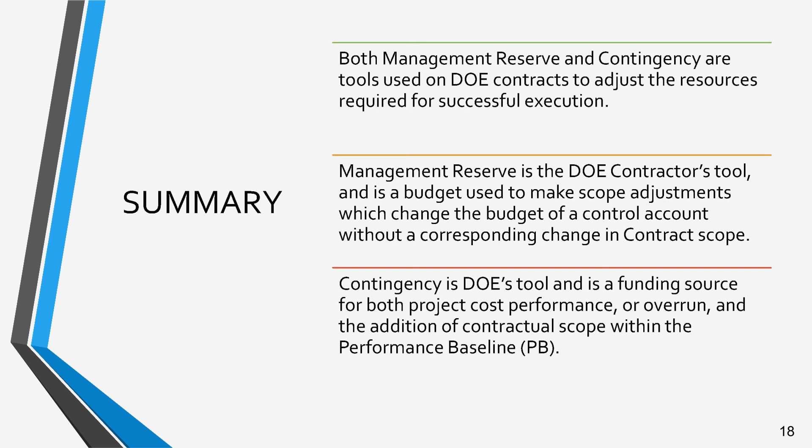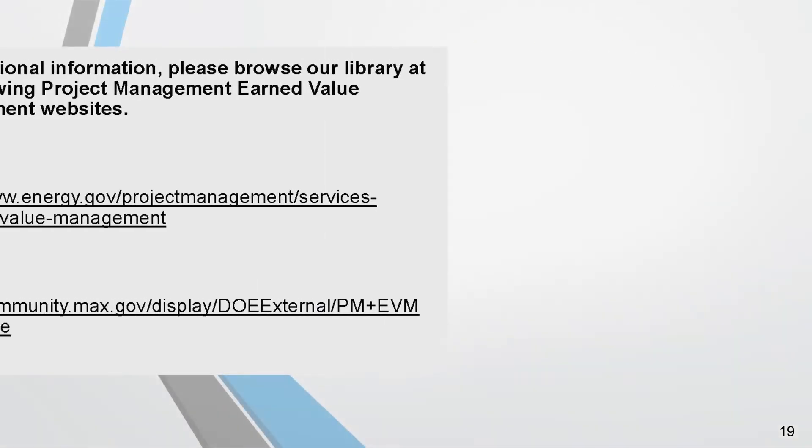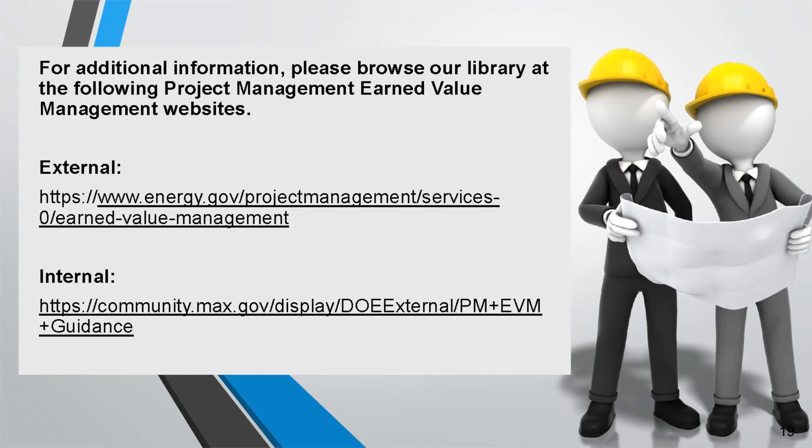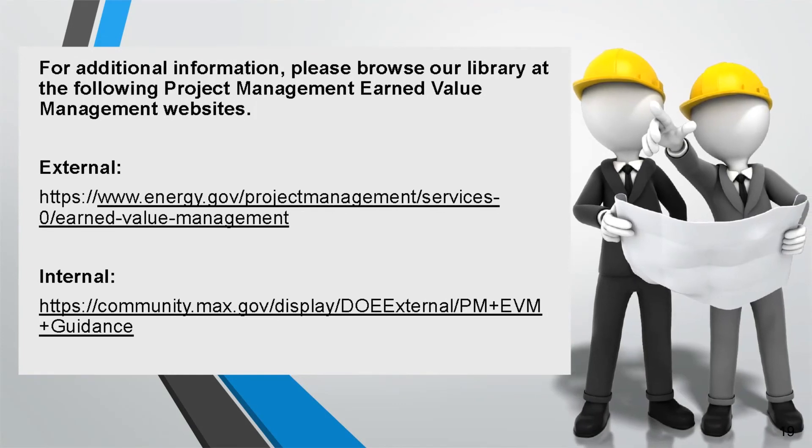No contractual change is required for MR use. Contingency is DOE's tool and is a funding source for both project cost performance and for the addition of contractual scope within the project's performance baseline. Please refer to Snippet 6-3-B for a discussion of different management reserve and contingency detailed scenarios of how normal project changes impact the performance measurement baseline, management reserve, projected variances at completion, and DOE contingency.